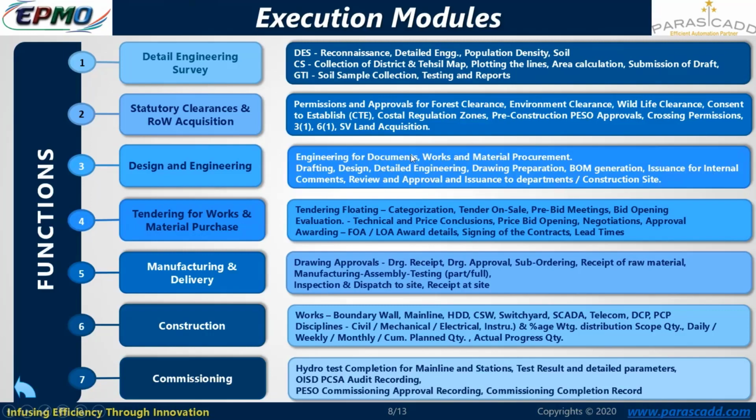So these key stages that I am reading are defined here as milestones, and these key stages also have weightages. I have the documents, and I have the number of row items that need to be processed. Those particular documents or work items have certain weightages, as well as each milestone also has certain weightages for monitoring.